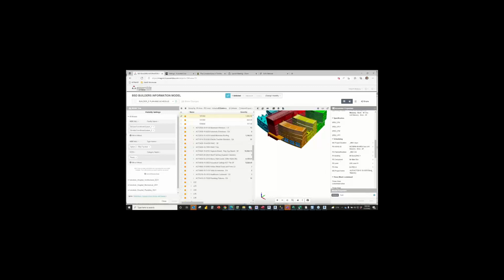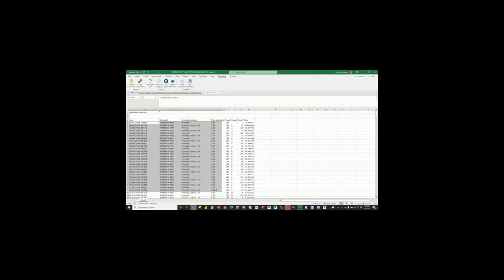I'm from there able to mine a lot of data from this using a tool called Assemble Connect. This is where I was able to mine and combine my schedule activity codes, inclusive of what I would use as project activity coding in a P6 context or utilize in text fields in Microsoft Project.